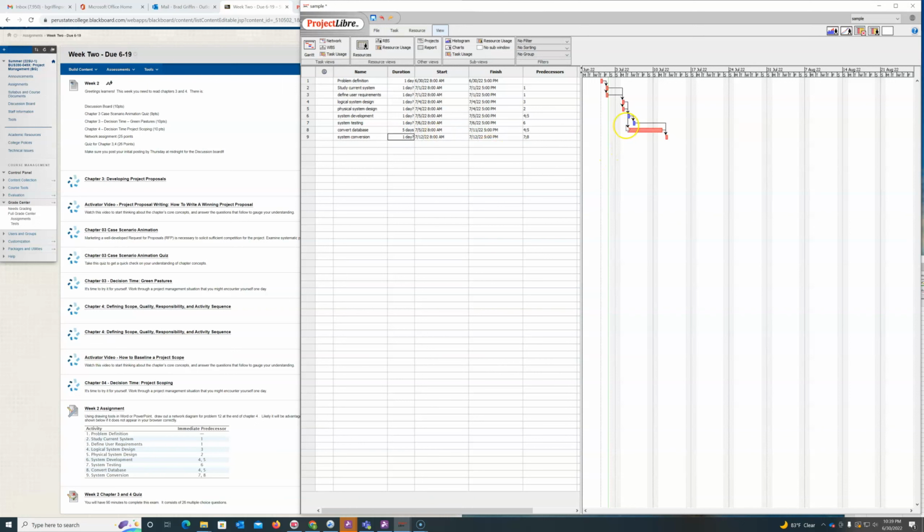Because it takes longer and pushes out that entire project, now 2 other items are off the critical path, and item 8 or whatever becomes part of that critical path. So we can also look and see what happens. Oh, if I get it down to 2 days, what happens? And interestingly, at 2 days, every item in here is on the critical path. So any item going long would then drag this project out over time.